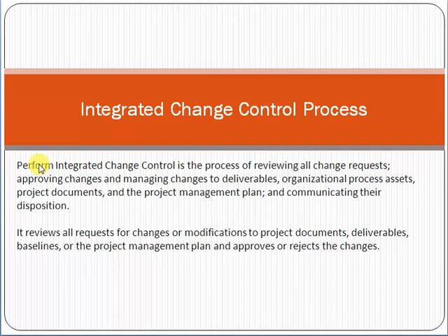Now friend, if you understand the concept of a change, what is the integrated change control process? Integrated change control process means that whatever change is arising, we have to understand that change's impact in terms of time, cost, risk, issues, communication, and other factors as well.